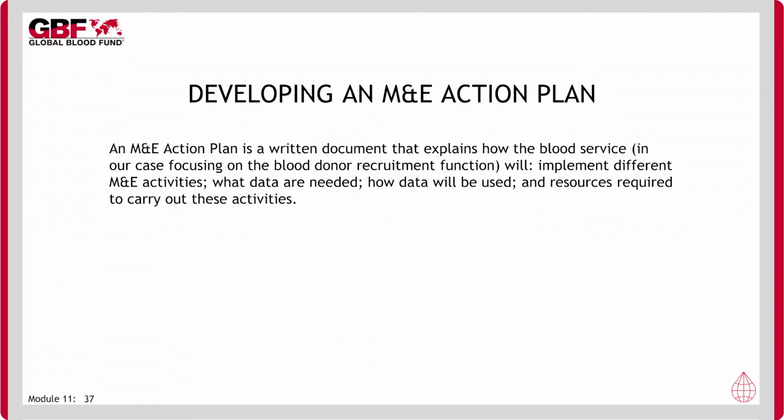All the key requirements we have discussed so far will need to be consolidated into a single document known as the Monitoring and Evaluation Action Plan for the Blood Donor Recruitment Program. This action plan is a written document that explains how the blood service will implement different monitoring and evaluation activities, what data are needed, how data will be used, and the resources required to undertake each activity.